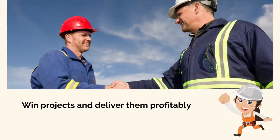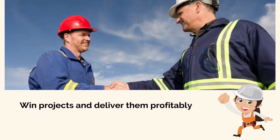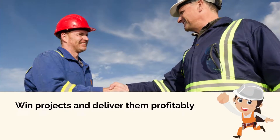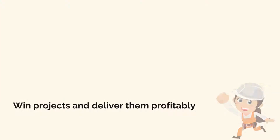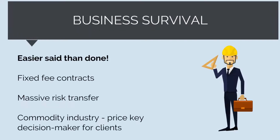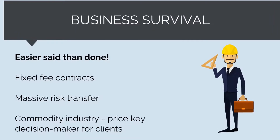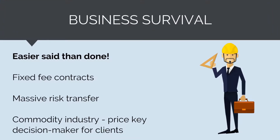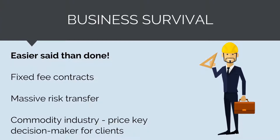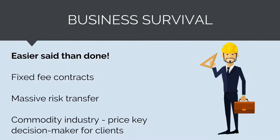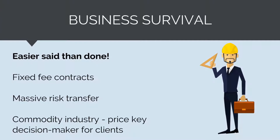As a construction company, to generate profit we need to win projects and then deliver them profitably. Unfortunately, this is easier said than done. Construction contracts are usually fixed fee, meaning a contractor is paid what they quote for the job, not the actual costs to complete the works. So if you quote $5 million to build a bridge and it costs $50 million, the client is still only going to pay $5 million.